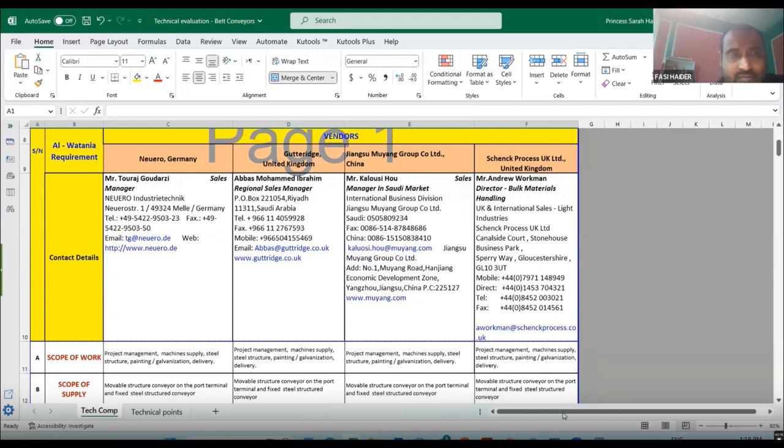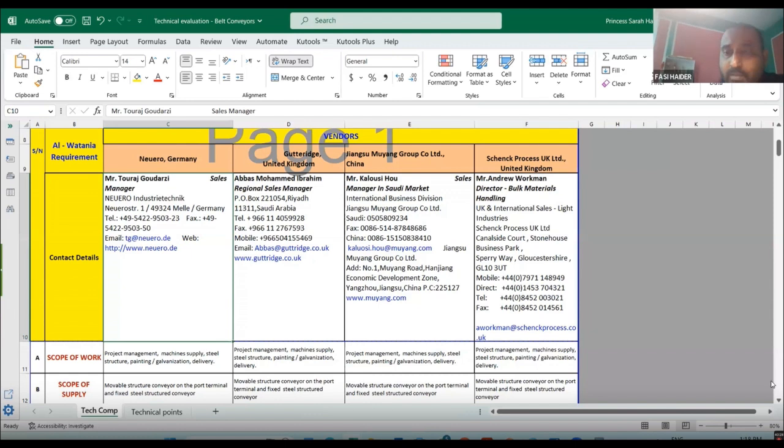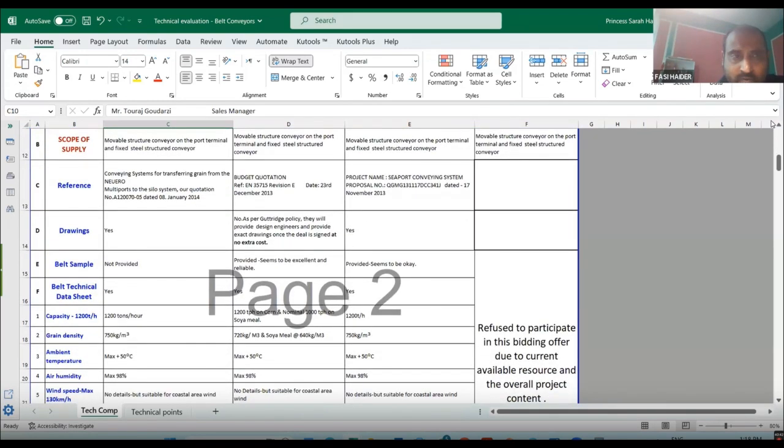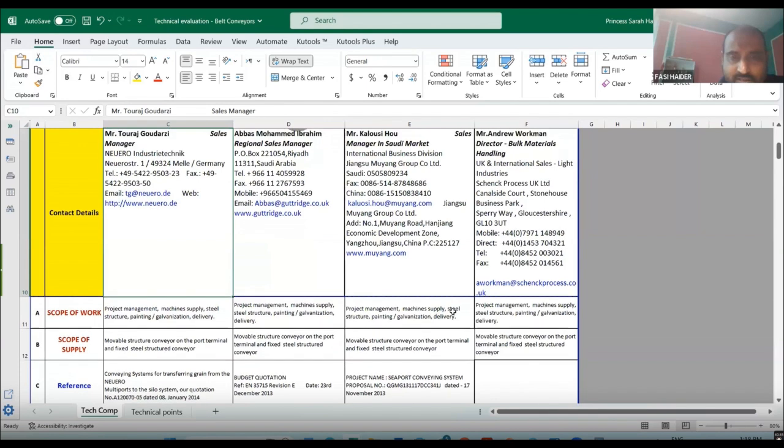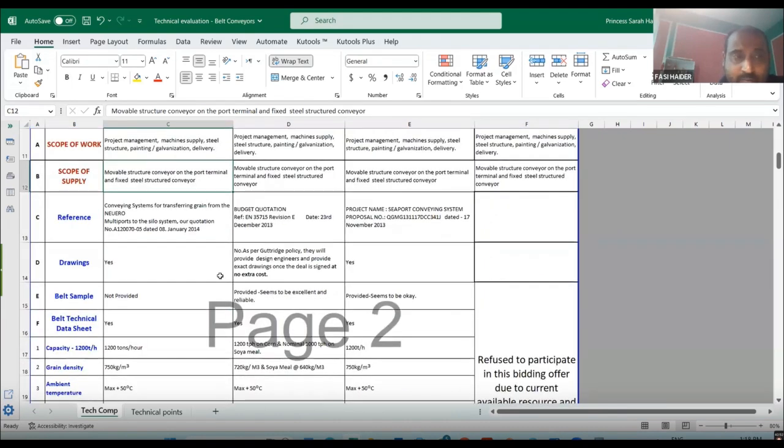Generally, what I've done is put the company names: Neuero, Germany; Guttridge, UK; Jiangsu Muyang Group, China; Schenck Process Limited, United Kingdom. So these are the people. Then I put the contact details. As I said to you before, when you make any report, you have to make it from the layman's point of view so that anybody can understand and contact, to be transparent. So I have written what the scope of work is. The scope of work will remain the same for everybody. Then, what is the scope of supply? This is what they are supplying, what we have requested them to supply.